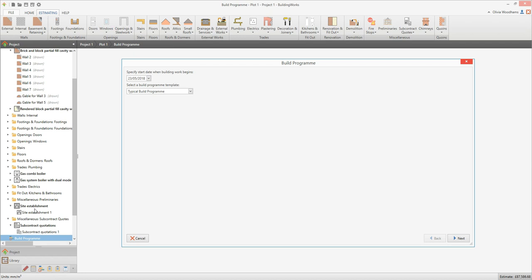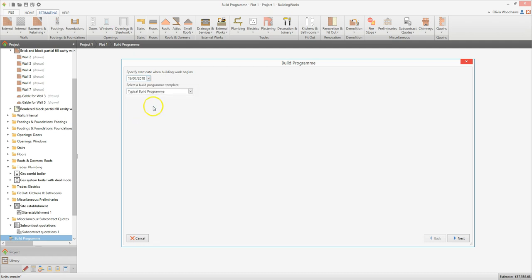A dialog box pops up prompting you to enter some key information. Select a start date by clicking on the drop down box. Then select a build program template from the drop down box — the template controls the order of the build phases in the Gantt chart and their dependencies. For example, our typical build program assumes that the masonry shell and roof need to be completed before windows and doors are installed. However, if you were building a masonry skinned timber frame building, you might want to make the building weather tight and begin the internal works before starting on the masonry skin. You could set up a new build program in your library to reflect this. Click next.